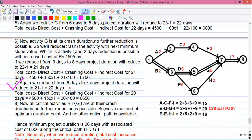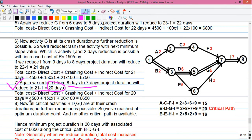Step 7: We reduce activity I again from 8 days to 7 days. Project duration reduces to 20 days. Total cost: 4500 + 150 + 20×100 = 6650 rupees.